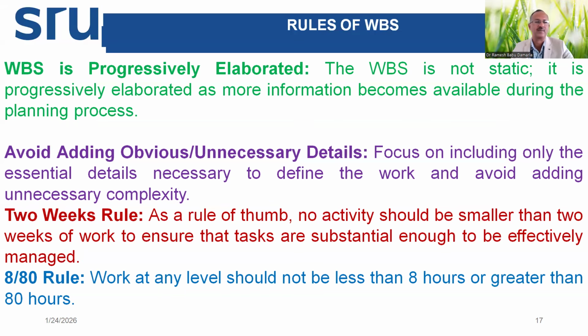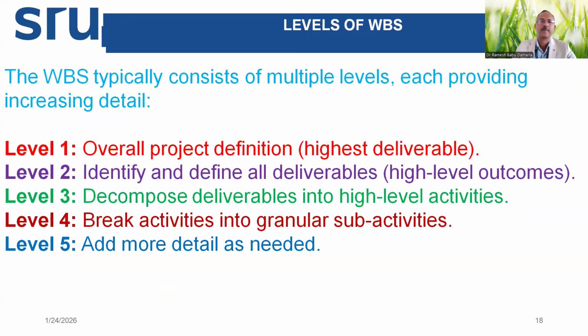The 8 by 80 rule means work at any level should not be less than 8 hours or greater than 80 hours. This is a thumb rule, and may not be applicable for small projects.